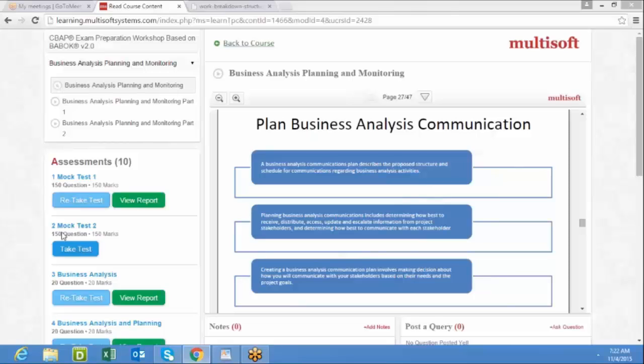Who will be impacted? Now, if there are 500 people, you would be assessing their power, their influence, and their interest in your project. This you can only assess by, for example, taking a first warm-up session or doing a deeper analysis of the project. If any similar project was done in the past, you can analyze that as well: who were your stakeholders, or who were your key stakeholders. So these are some ways, some tricks, for how you identify the key stakeholders.